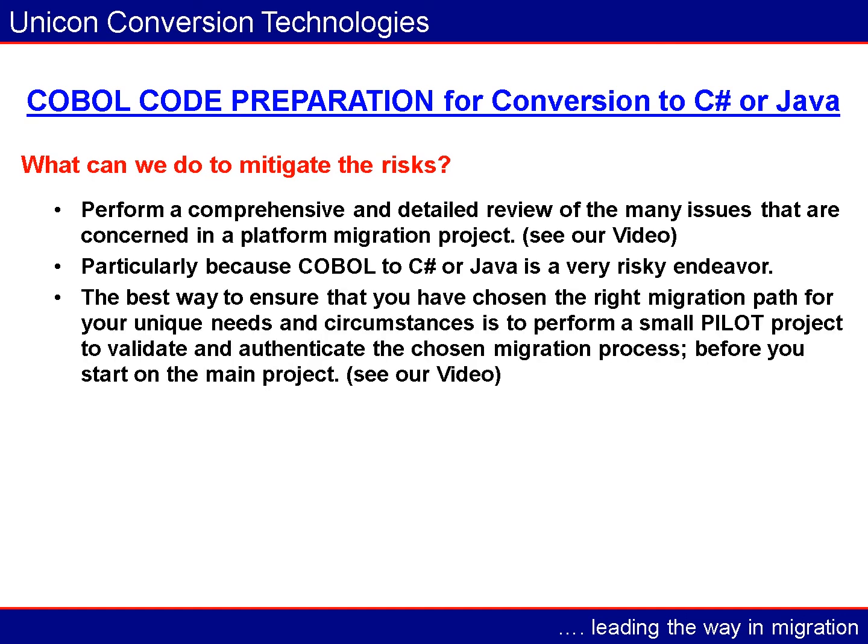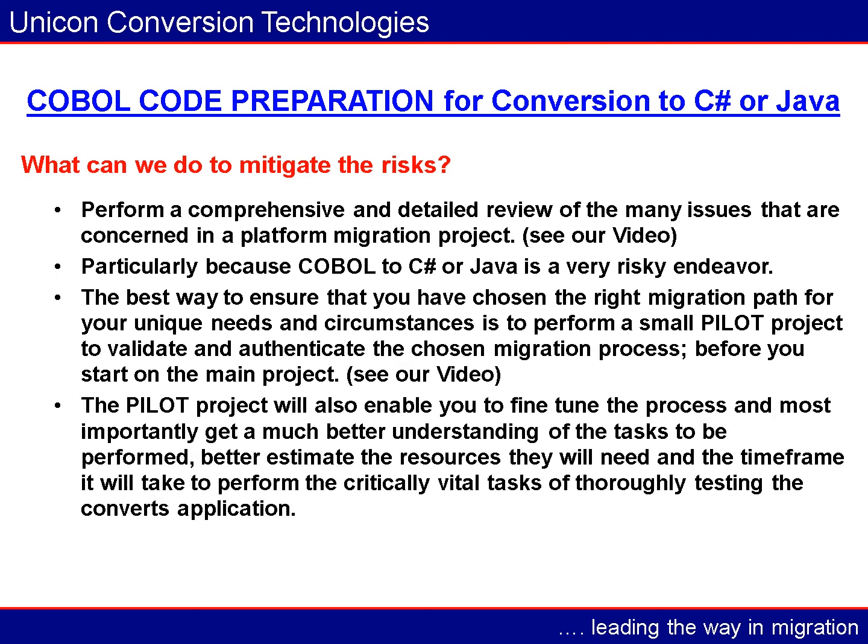The best way to ensure that you have chosen the right migration path for your unique needs and circumstances is to perform a small pilot project to validate and authenticate the chosen migration process before you start on the main project. The pilot project will also enable you to fine-tune the process and, most importantly, get a much better understanding of the tasks to be performed, better estimate the resources they will need, and the timeframe it will take to perform the critical vital tasks of thoroughly testing the converted application.